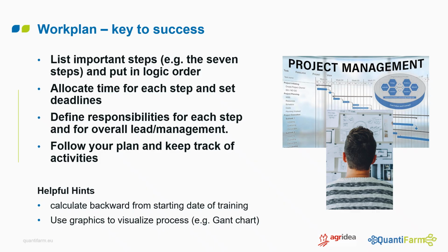Then follow your plan and keep track of the activities so as to assure you're in plan and on time. Well, of course, it helps to calculate back from the starting date of the training to see when you have to start with each step. Start with the last step and calculate backwards. In our organization in Switzerland, for example, I usually see that for a one-day training, I have to start 3 months before so that all is ready in time.